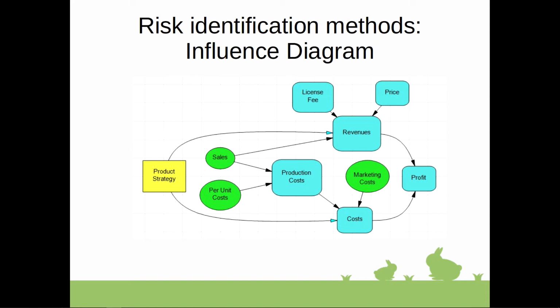Third, you recognize secondary factors that affect uncertainty associated with performance factors. Fourth, you identify second-order risk factors that can influence these secondary factors. And you continue to figure out what factors influence uncertainty until all key risks are identified.